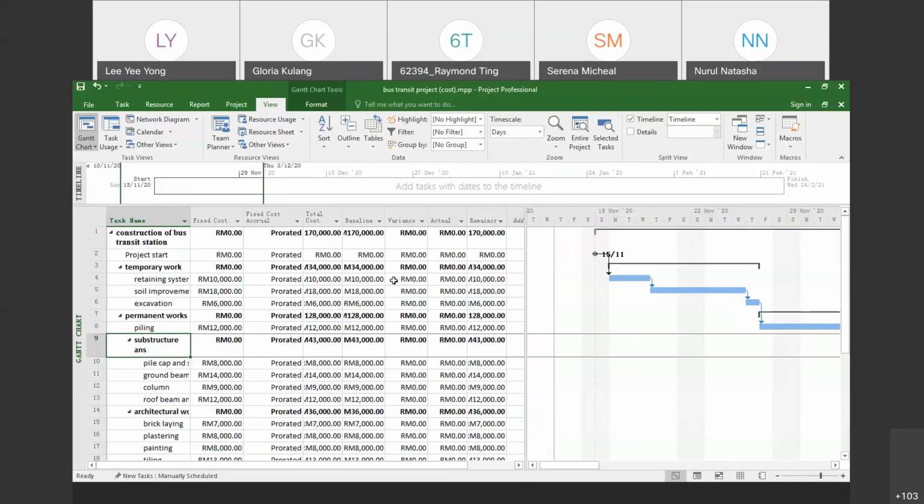So next, I would like to give add-on information on your financial and physical S curve. You can draw your financial and physical S curve by extracting the data from Microsoft Project. Microsoft Project cannot draw the financial and physical S curve for you, but it can provide you the information. You need to draw the S curve using Excel, but you can extract the data from Microsoft Project.